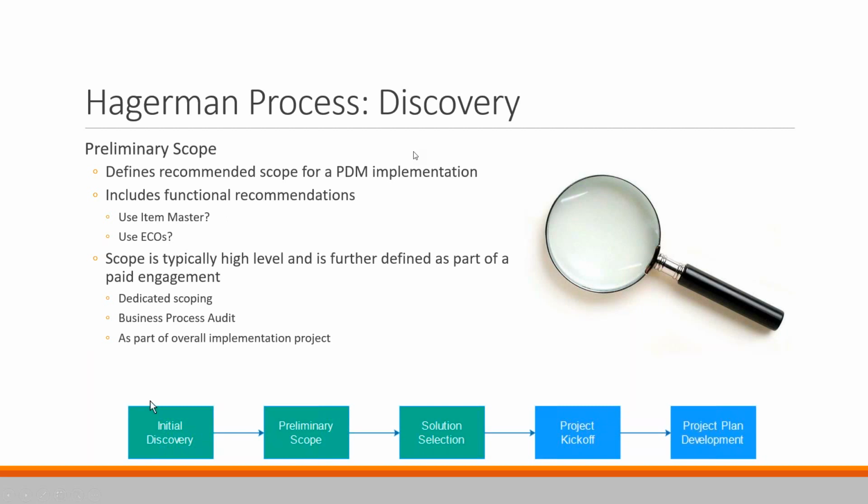What I will typically do is say, based on what we've discussed and what your needs are, here's what we think you should implement. Here's how long we think it's going to take for us to help you do that. And then if that ultimately doesn't fit in the budget, it's like, okay, what is your budget? And what can we do?